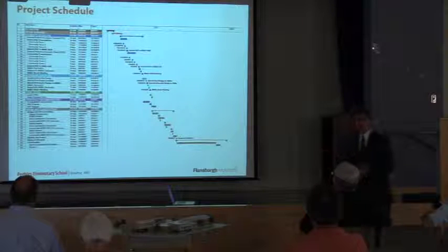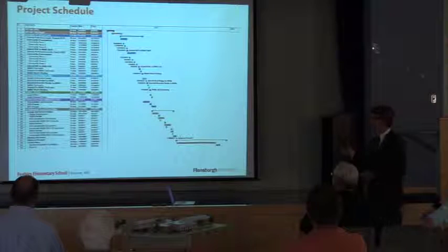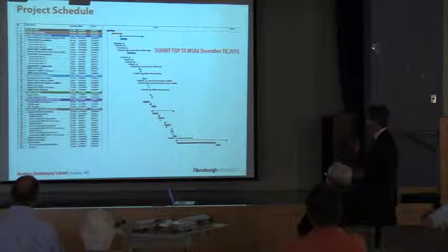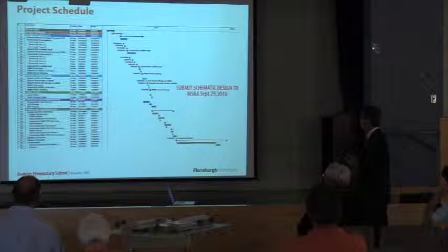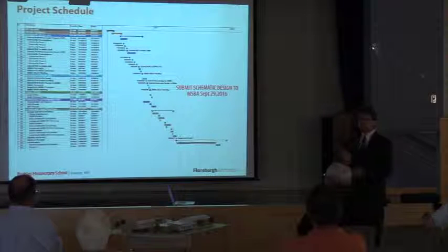I know this is our guiding schedule. Let's pull up a few dates. For that, we submitted the PDP on December 18th, the PSR on June 2nd. We're going to submit the schematic design on September 29th.